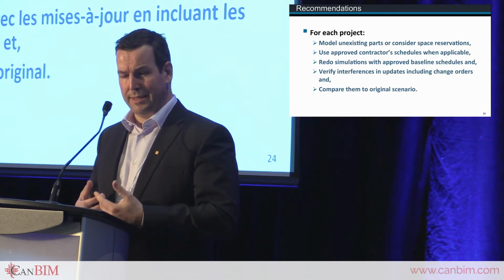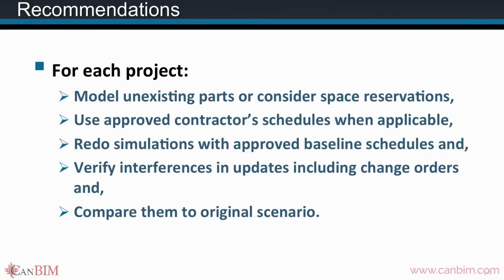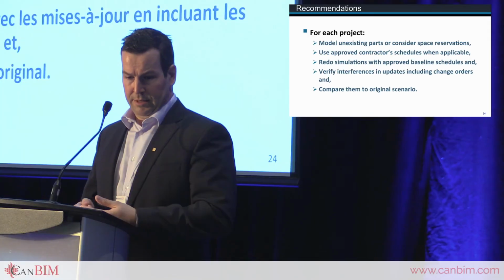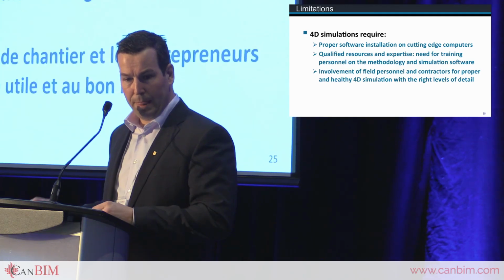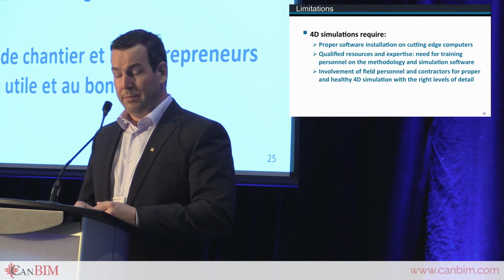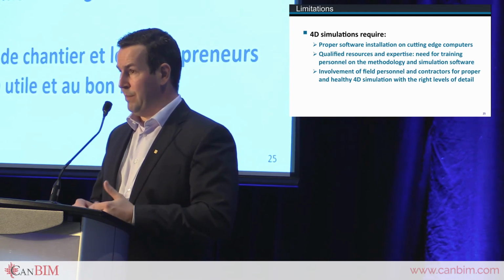Recommendations. Well, we recommend modeling the elements. We want to consider reservation of space if the model elements don't exist, and if they do exist, to model them. Obtain approved schedules from contractors where possible. Check interferences with updates, including change requests, and compare all of this with the initial scenario, as well as repeating simulations with the approved benchmark scheduling.